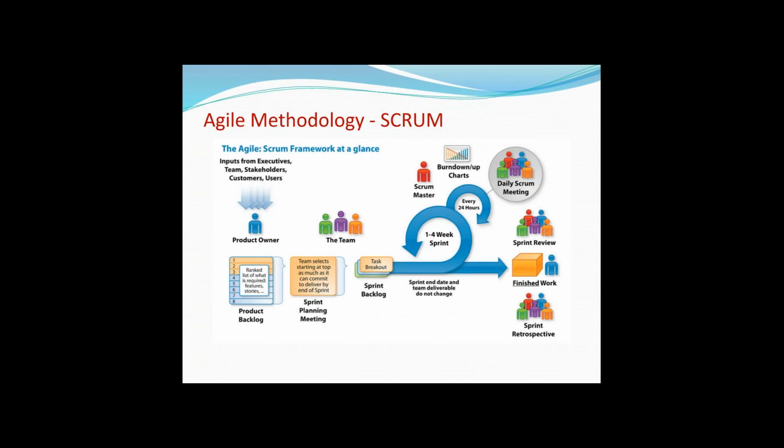First piece: let me create a UI, user interface, where I create all the text boxes and do client side validations, like JavaScript validations, in the first 2 weeks. In the next 2 weeks, I will create an application on the back end so that it can get the data from the front end and store it into the database. That is what I do in the next two weeks, which means I'm breaking down the task into smaller pieces and achieving smaller tasks in shorter spans. Okay, clear?